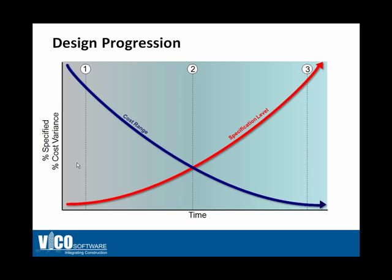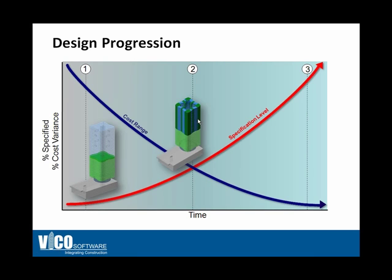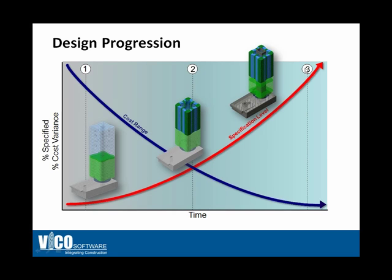Throughout the design phases, however, as decisions are being made, the specification level goes up, and that means you narrow the cost range you need to work with. We can project example stages of the model on that curve, starting with the conceptual design model and gradually adding more detailed information, working towards a schematic design model. Number three is the as-built situation, when the specification level is 100% and the cost range is zero.